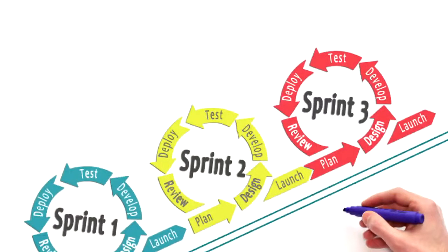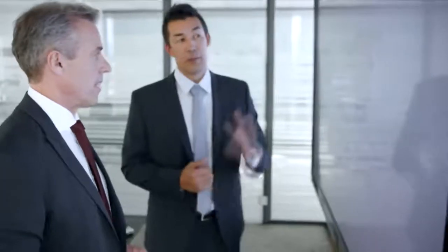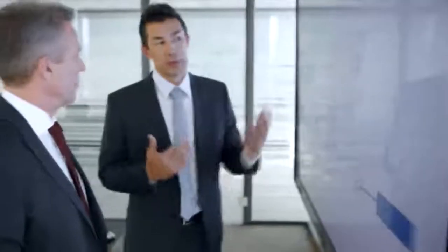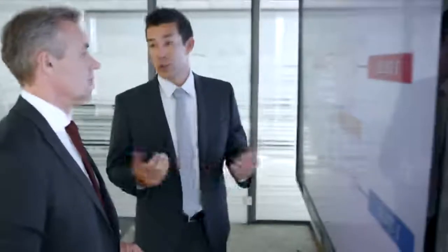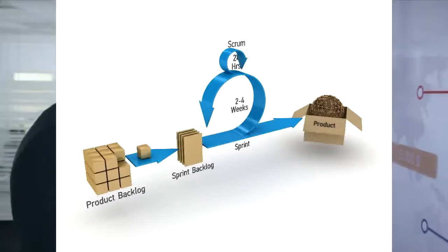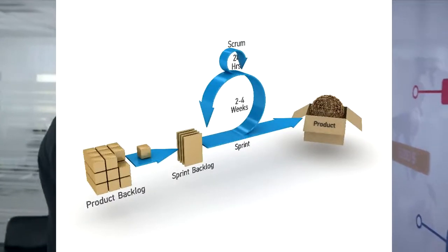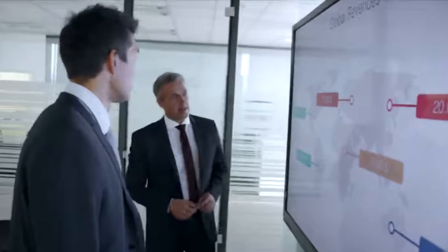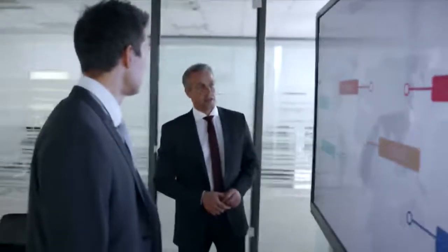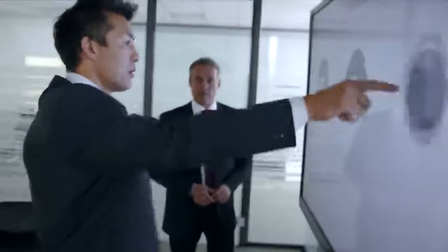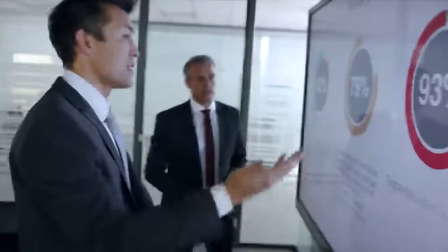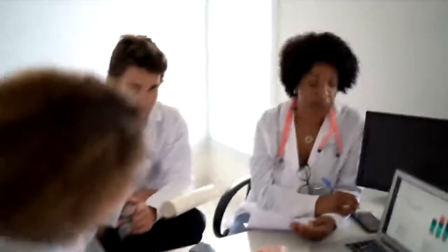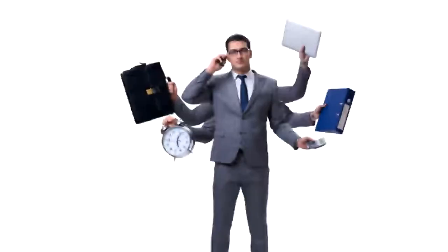We also understand that the self-organizing team is autonomous. The self-organizing team is able to make decisions. The self-organizing team is able to call the shots on any user story, on any piece of the product backlog, any PBI. The team should be able to work with the product owner to understand what is required, and based on risk and value, the team works with the product owner to decide yay or nay. And once the product owner decides this is too little value for the risk, they could choose to move that right down to the bottom of the product backlog.